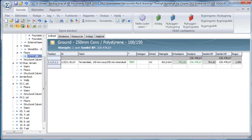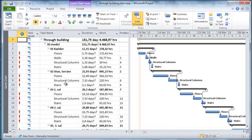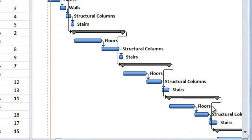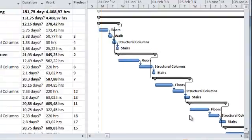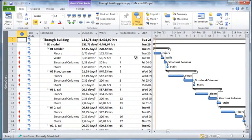This export to Project led me to this view, which shows the planning of the different areas, particularly the cellar with the floors. If I want more detail, I would have chosen several levels in the export. This is the planning which I have manually linked according to the way I wanted it to be linked.